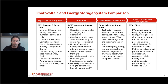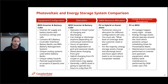Maintenance is normally performed on inverter and upstream equipment, while battery banks, strings, and cells are covered by the OEM under LTSAs and warranties. Energy storage assets can operate around the clock, which presents unique scheduling challenges for preventative maintenance — it's not as easy as saying the PV plant will be offline at 10 PM, since battery systems may be in operation late in the evening.